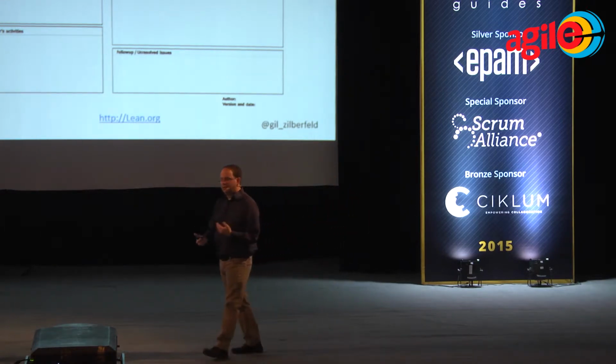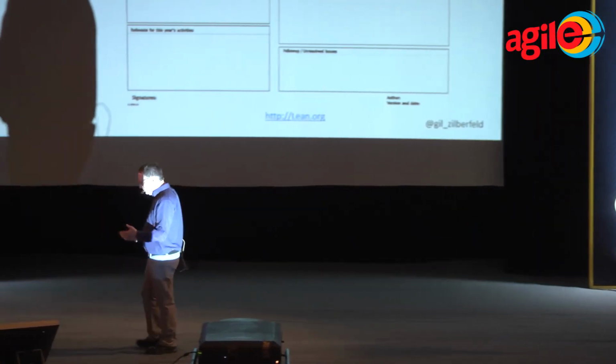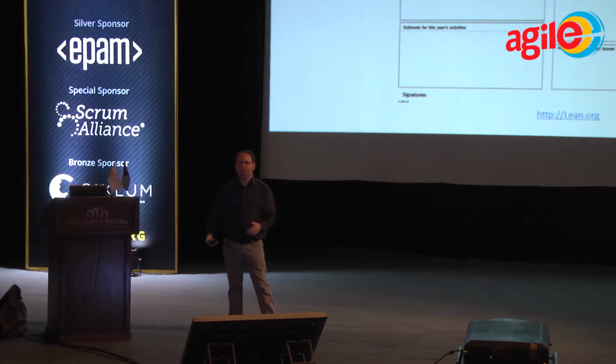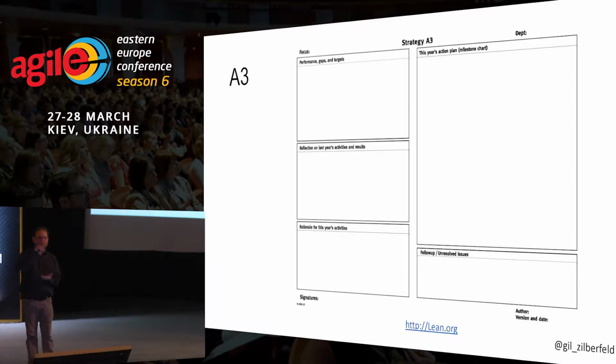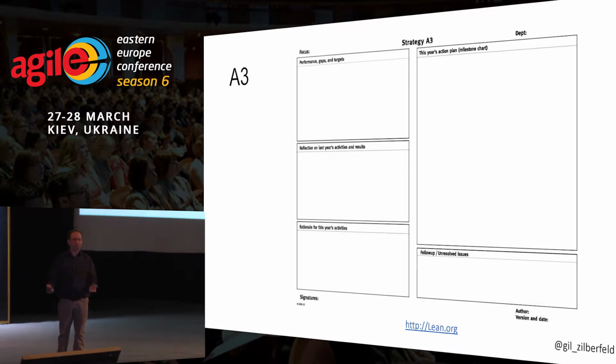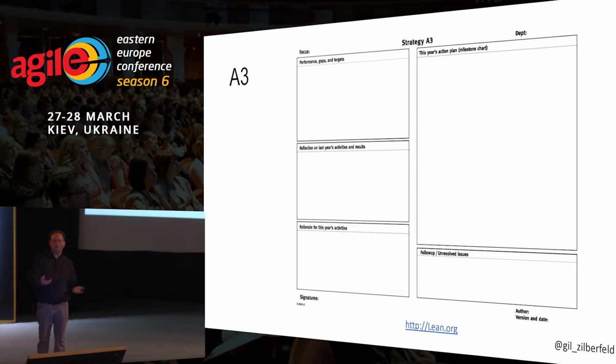the same thing with my backlog when I was a product owner. After a while, I decided that the product backlog got too big for me to manage, so I decided to put a constraint on it. And when something was pulled out by me from the backlog, it vanished. Actually vanished. I deleted it from everywhere else because people were just thinking, what will happen if we need it?